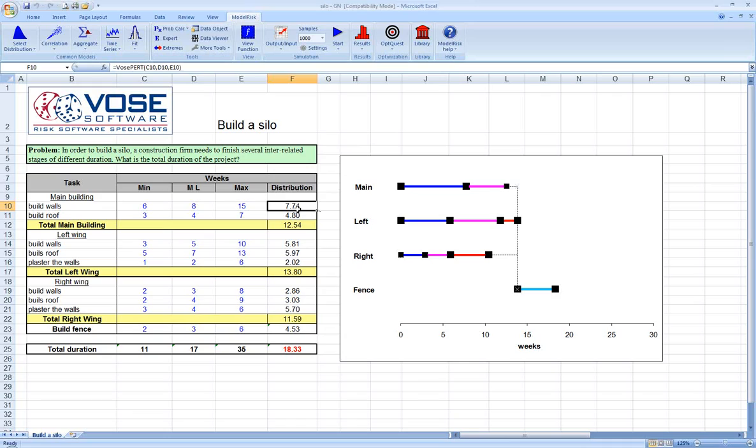What we've done for each of the main buildings is add up the total amount of time. Then we take the maximum of those three values and add them to the value for the number of weeks required to build the fence.